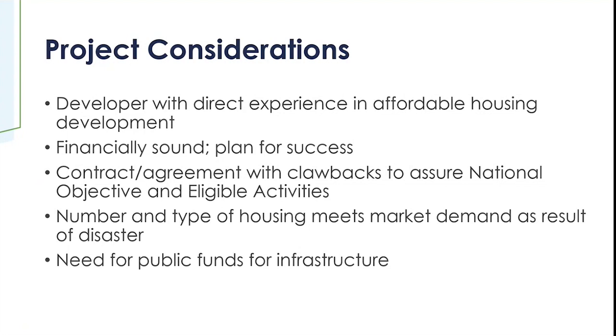Make sure you enter into contracts which spell out responsibilities and expectations and contain penalties for noncompliance. The entity that you're partnering with that's building the housing is ultimately responsible for your ability to meet the national objective, and if you don't meet a national objective, the funds must be returned. Make sure that your contracts reflect that.